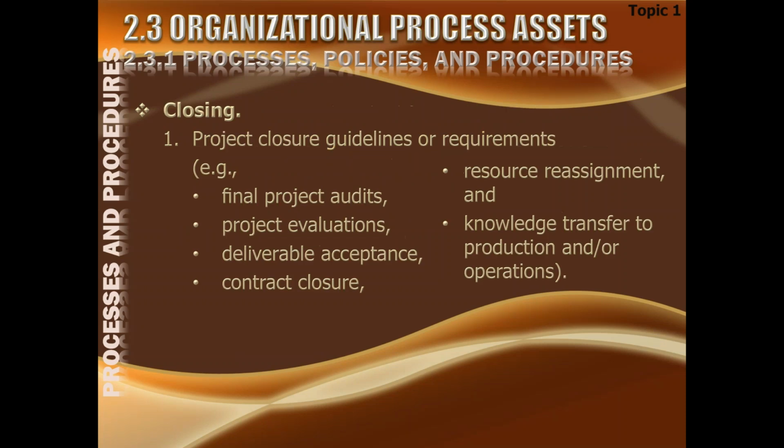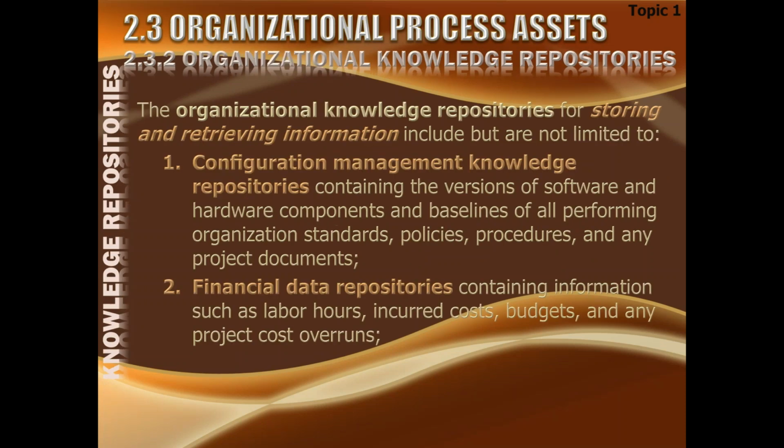organizational process assets. As far as closing is concerned, for project closure, we must have some guidelines or requirements like how the final project audit will be conducted, how project evaluations will be conducted, deliverable acceptance, contract closure, resource reassignment, and knowledge transfer to production or operations.